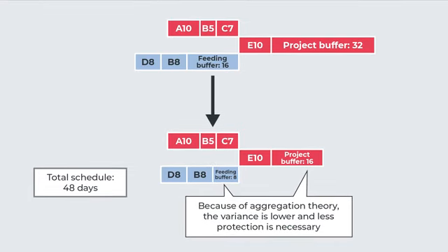As you can see, the project duration changes from the initial 64 days to 48 days. Nevertheless, you can observe that there is a conflict in assignment of resource B. This can be resolved simply by moving the activities.